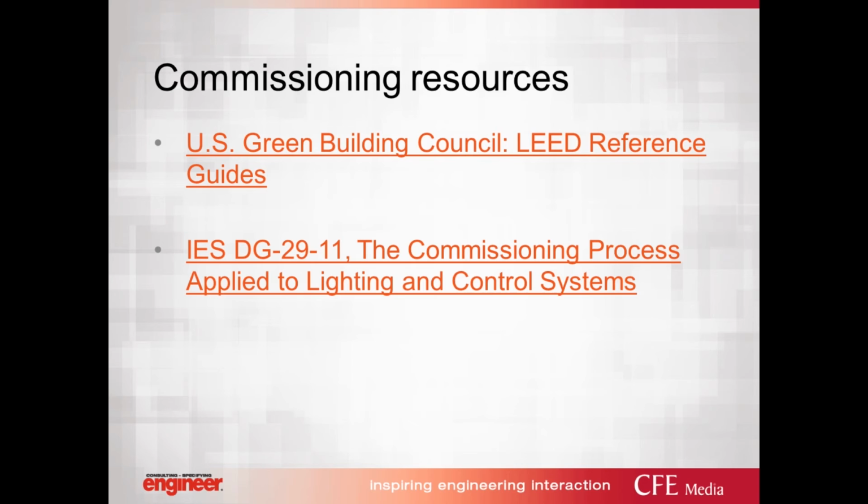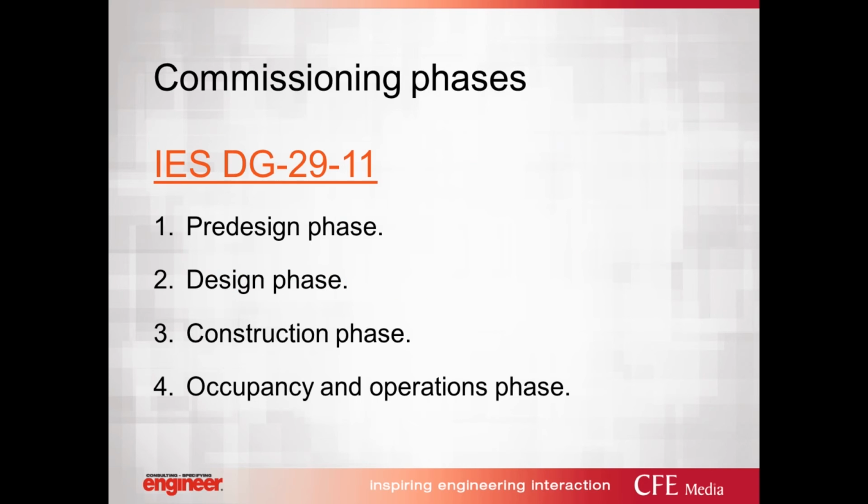So there are some resources for commissioning, and you'll be able to click on these for additional information. LEED requires commissioning, which has fundamental commissioning, and there's also enhanced commissioning. The fundamental commissioning for LEED may not marry up exactly with the ASHRAE version. So again, you want to make sure that you look at both if you're using both on a project. And then the IES has a publication on the commissioning process, and we'll just talk about that really quick.